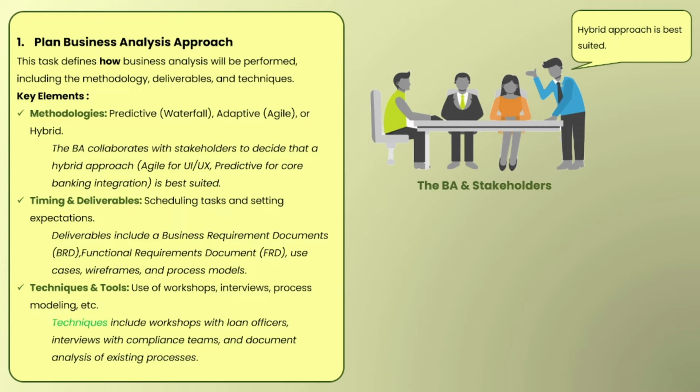Whereas, on the other hand, the integration with the core banking is more fixed and critical, so it was handled using waterfall and completed early in the project. Most banking projects follow this particular methodology. This is the hybrid methodology which we have just discussed.